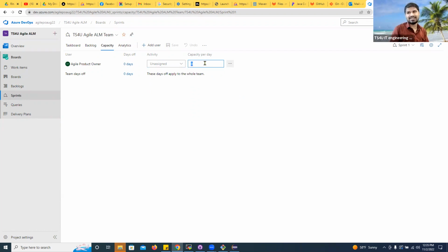As I said, you cannot cross more than 8 hours. Remember we talked about business hours: very few team members can work 8 hours in a row, because we are in meetings 3 to 4 hours, or maybe 2 hours. So if you are an exception, with a lot of meetings and only 2 hours a day, you put in 2 hours. So 10 days, 20 hours only of work. The remaining 5 hours, you are in meetings.